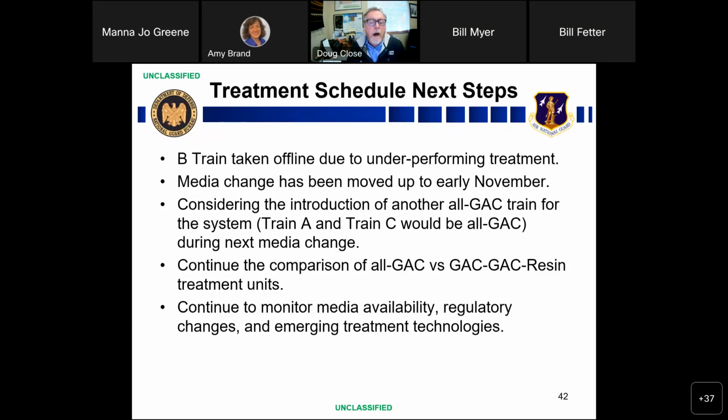We took it offline. We immediately began scheduling with our contractors for another media change. I've got an early morning meeting with them tomorrow. We're anxious to go ahead and make a media change in early November. We were probably looking at after Thanksgiving originally, but with those numbers creeping up, we want to be proactive and go ahead and get clean media put in there.